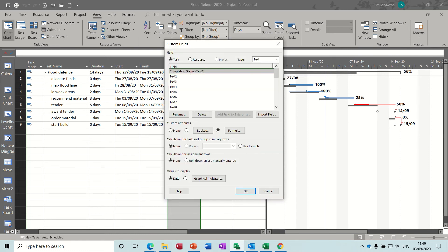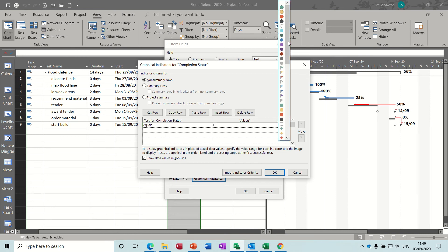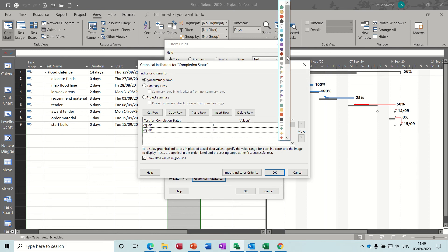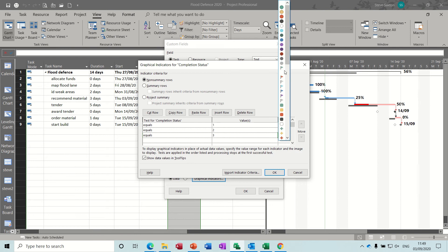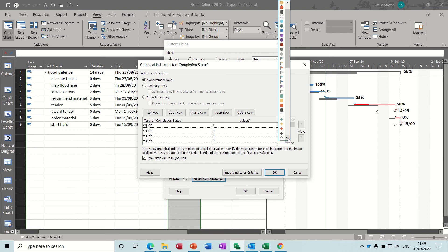That's selected still — graphical indicators at the bottom. So if it equals 1 I want the image to be a green circle. If it equals 2, I want that to be an amber circle. If it equals 3, I want that to be a red circle. And if it equals 4, which means it's not started, I just want a dash — a little red dash or whatever colour you want.